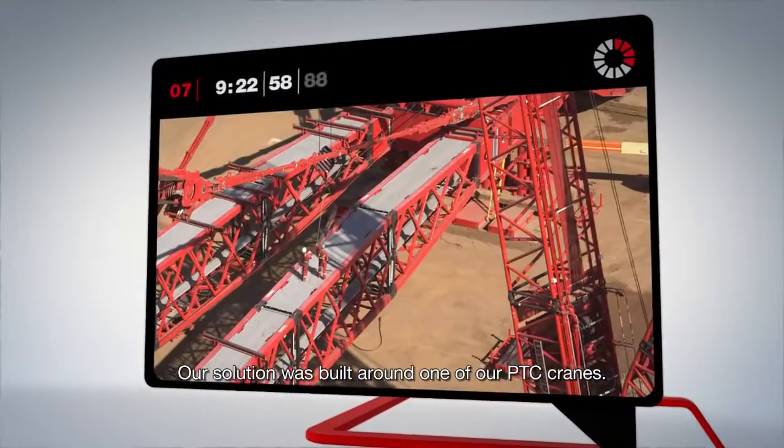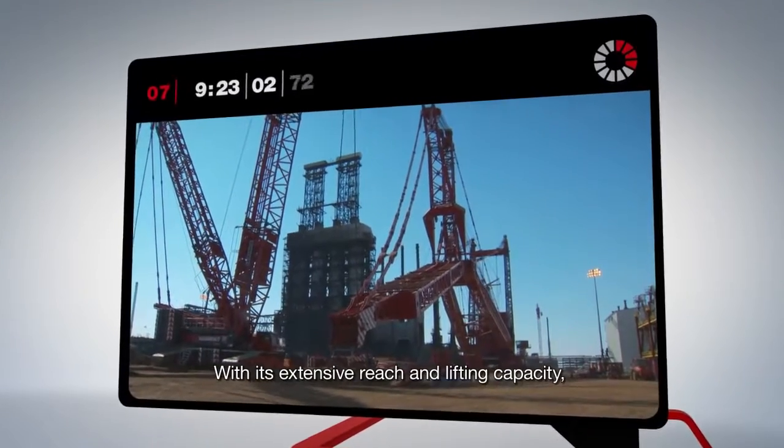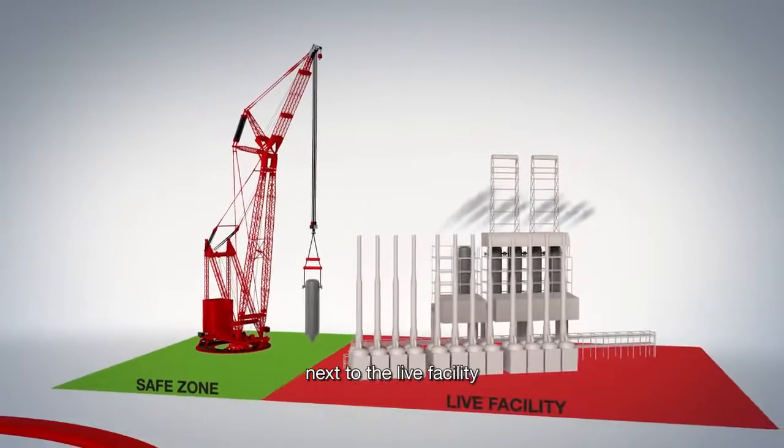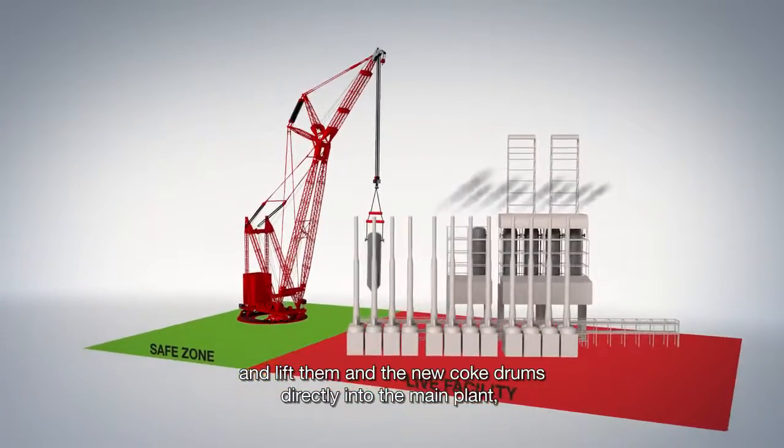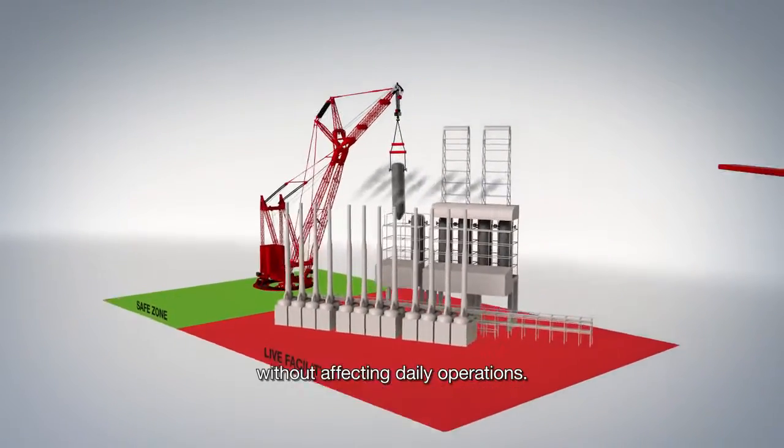Our solution was built around one of our PTC cranes. With its extensive reach and lifting capacity, it was possible to construct large modules next to the live facility and lift them and the new coke drums directly into the main plant without affecting daily operations.